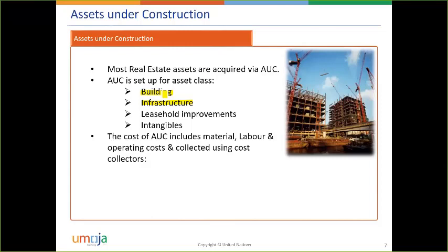So the idea is that you are here to understand how your transactions are impacting the project. What projects are you normally going to be impacting? The projects that you're going to be impacting are set up in the system normally by engineers. So if you are requested to issue materials out of inventory for a project, the first thing you need to do is to ask the engineers managing the project, what is the code of the project?